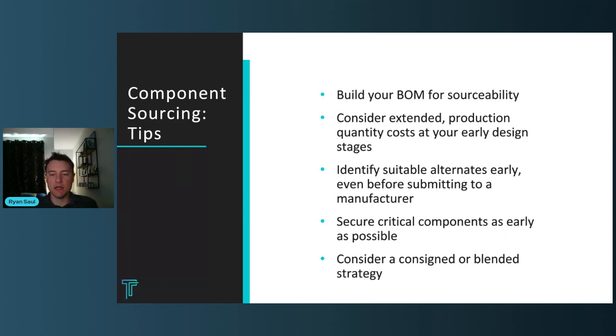I would say that instead of the exception, it's become the most common scenario for us as an NPI manufacturer to be receiving hybrid consigned kits from our customers. Even when we are building full turnkey, they'll say, okay, we want you to quote this full turnkey, but FYI, these 3 line items, we're going to be providing those. That is such an important solution to this issue.